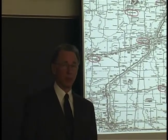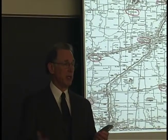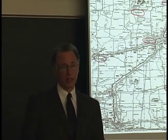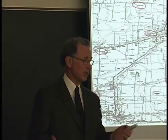The concrete supplier, he doesn't care whether you've made a mistake or not. If you have bid it that it's going to take 350 yards of concrete and it takes 380 yards of concrete, you're going to get charged for 380 yards of concrete. He doesn't care.